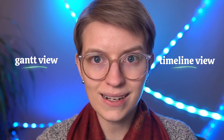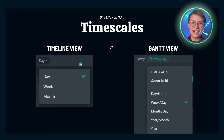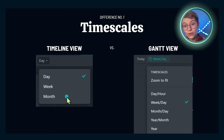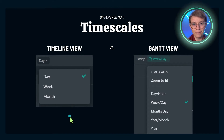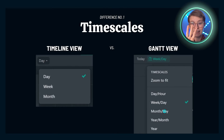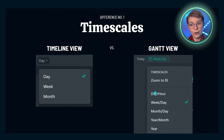The first difference between timeline view and Gantt view is the zoom factor. With timeline, we're limited to only zooming in and out based on days, weeks, or months — there is no year or hour option. Meanwhile, in Gantt view, we can still sort by day, week, and month, but we can also sort by day and hour and by year. Those are pieces unique to Gantt view. So if you need to organize work shifts or multi-year campaigns, you're going to be forced to use Gantt view because it's the only view that allows you to look at things at that time scale.